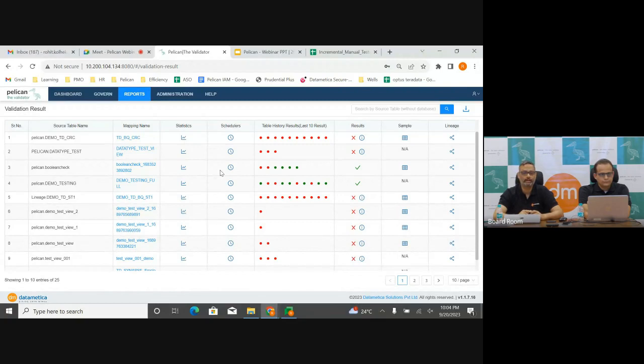You may not have any audit columns in legacy today, and you may want to bring a full-fledged audit framework into the new platform. Absolutely, we must use this opportunity to do that. What we may not want to do is bring in new KPIs or try to consolidate a lot of KPIs. This brings a different dynamic to the modernization. We rather suggest that you complete your modernization, get onto the cloud platform, retire your legacy, and then in subsequent phases do optimization and consolidation of the data model.